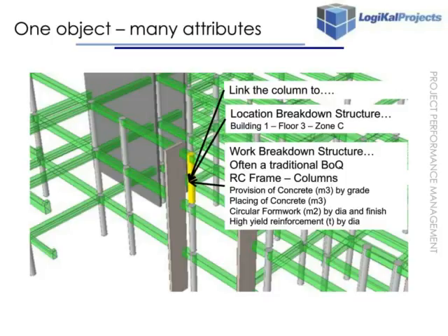And we also need to link that column to a work breakdown structure, for example, how we might be pricing or constructing the work. So if we take the reinforced concrete frame example, we might have 4 items of work there: provision of concrete, placing of concrete, formwork, and reinforcement. That might be how the work